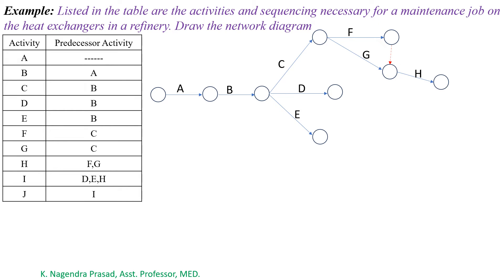Next, observe activity I. For activity I, D, E, and H are the predecessor activities, which means after completion of D, E, and H, activity I will start. So draw activity I.